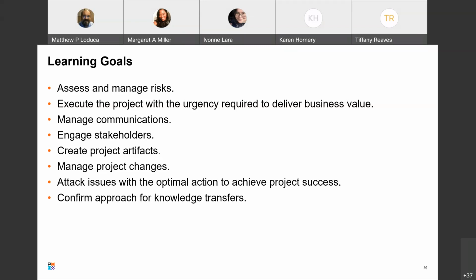I just brainstormed with these other guys and said, hey, how else can we do this? Because you're telling us that the impact on our clients is unacceptable. So we sat down and walked through it, and people said, well, what about this? And what about that? We had to do some other testing because someone brought up one thing that we didn't even think about, a risk we weren't prepared for. The risk never got realized, but it was a risk. We discovered it and tested for it right away. It was like, well, is this going to happen? And it was like, nope. It works fine, so we don't have to worry about this.